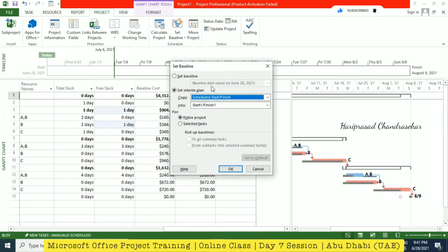What they're telling is that you should not change the initial baseline, because the record of your original planning process is very important to retain. A project that starts 6 months later than expected will show every task as late and every task as critical. So to continue generating useful project information, you need to revise the schedule in a better way. Only by setting interim plans can you see how well you focus on your goals. This is what they mentioned.